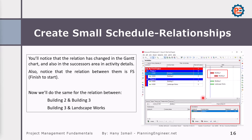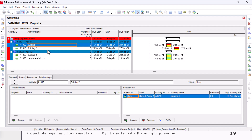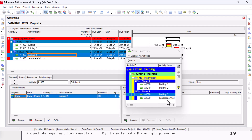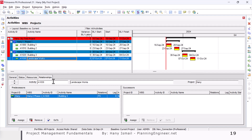We can see Building One now starts before Building Two. We can do the same between Building Two and Building Three, and Building Three and Landscape Works. Standing on Building Two, assign the relationship to Building Three. Then stand on Building Three and assign to Landscape Works. But remember, we need Landscape Works to start at the same time as Building Three. So we change the relationship type from Finish to Start to Start to Start — these two activities will then start at the same time when we run the schedule.